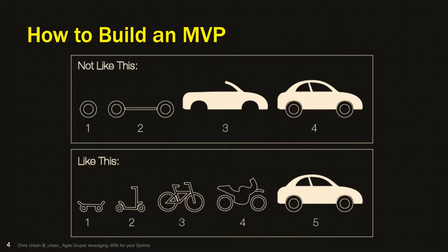That's the premise. A Scrum board is now you modify that a little bit and you compartmentalize it into a unit of time. Typically 2 weeks, it could be 1 week, it could be 4 weeks, but now you have a backlog of items that you want to get done in that work unit, in that time period, and everyone on the team is working together to get that unit of work done, not the entire backlog for the entire project. It's building the first sprint, the second sprint, the third sprint, and so on.